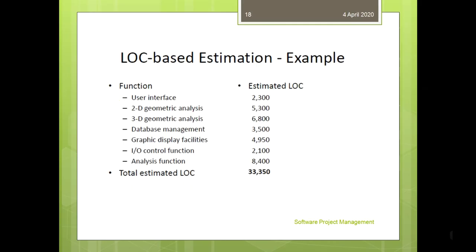An example for LOC-based estimation: here are all the functions and their respective estimated lines of code. User interface has an estimated 2,300 lines of code. 2D generation geometrical analysis has an estimated 5,300 lines of code. Likewise, there are many functions, and the total estimated lines of code is 33,350.